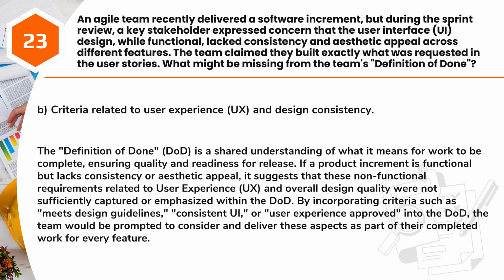Answer: B. Criteria related to user experience, UX, and design consistency. The definition of done, DoD, is a shared understanding of what it means for work to be complete, ensuring quality and readiness for release. If a product increment is functional but lacks consistency or aesthetic appeal, it suggests that these non-functional requirements related to user experience, UX, and overall design quality were not sufficiently captured or emphasized within the DoD.